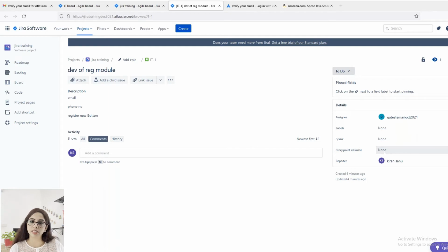And login is easier than registration, so login will have a story point of 2 and registration will have 4. And cart is even tougher, so it will have a story point of 6. Accordingly, the story points can be assigned, or the other process is to assign the exact number of hours needed. So efforts can also be assigned in the story points. It can also be odd numbers, if not even.